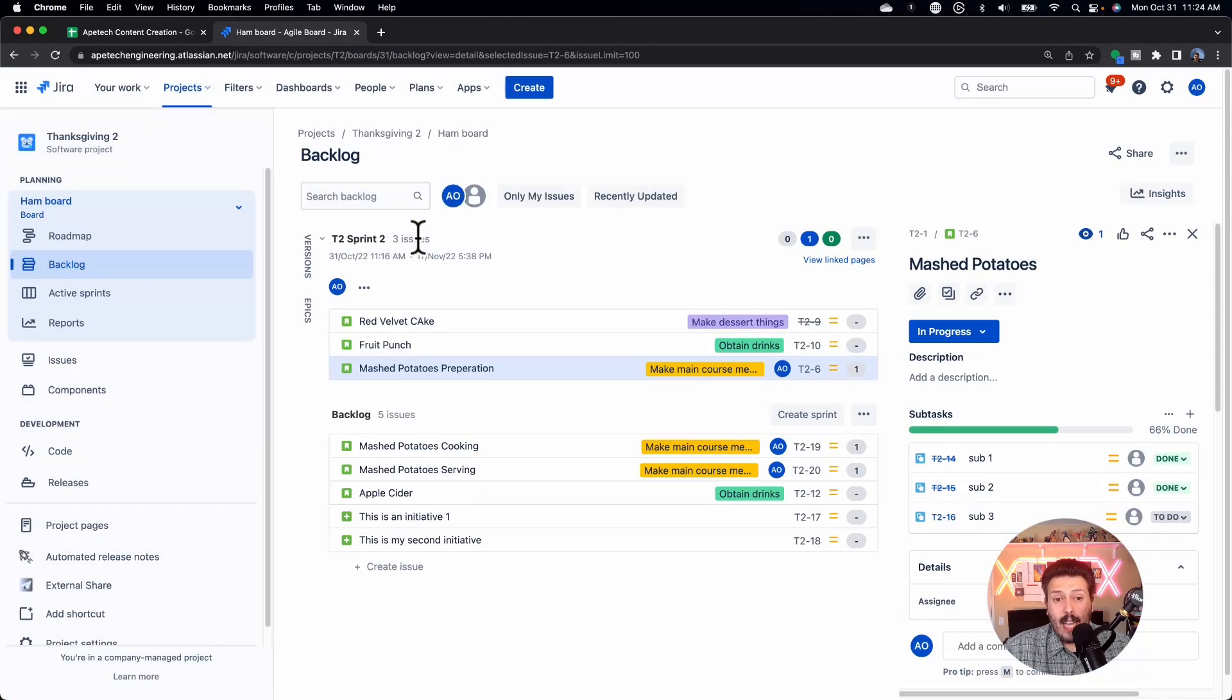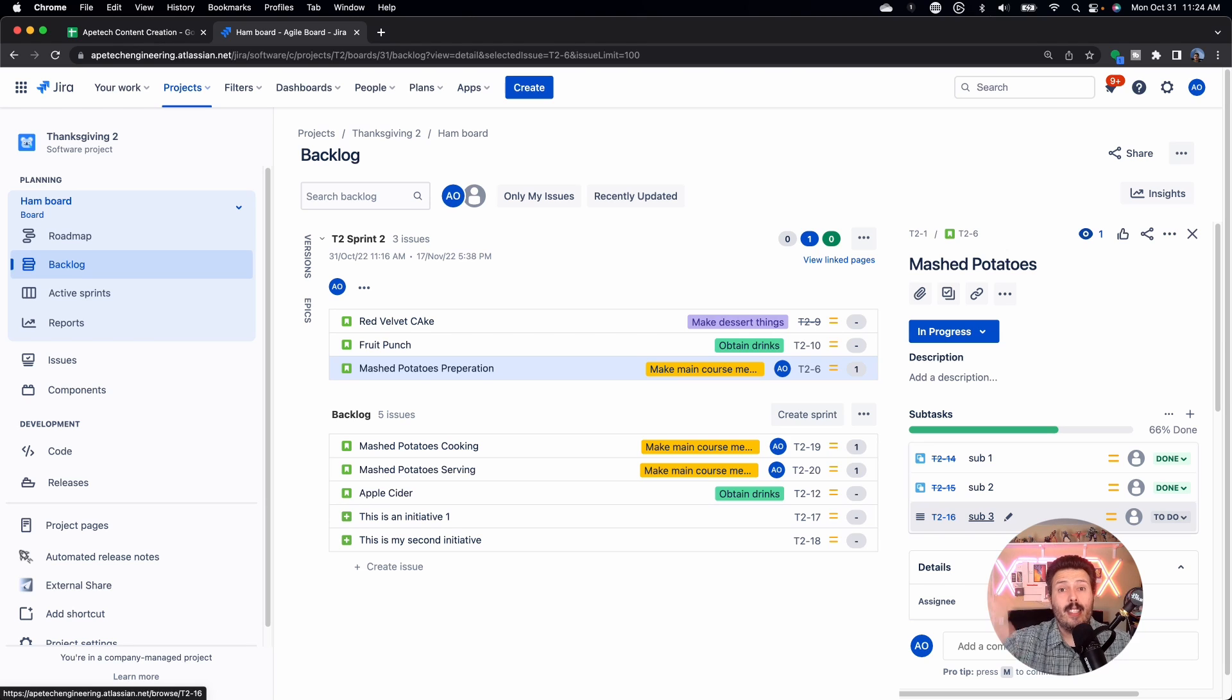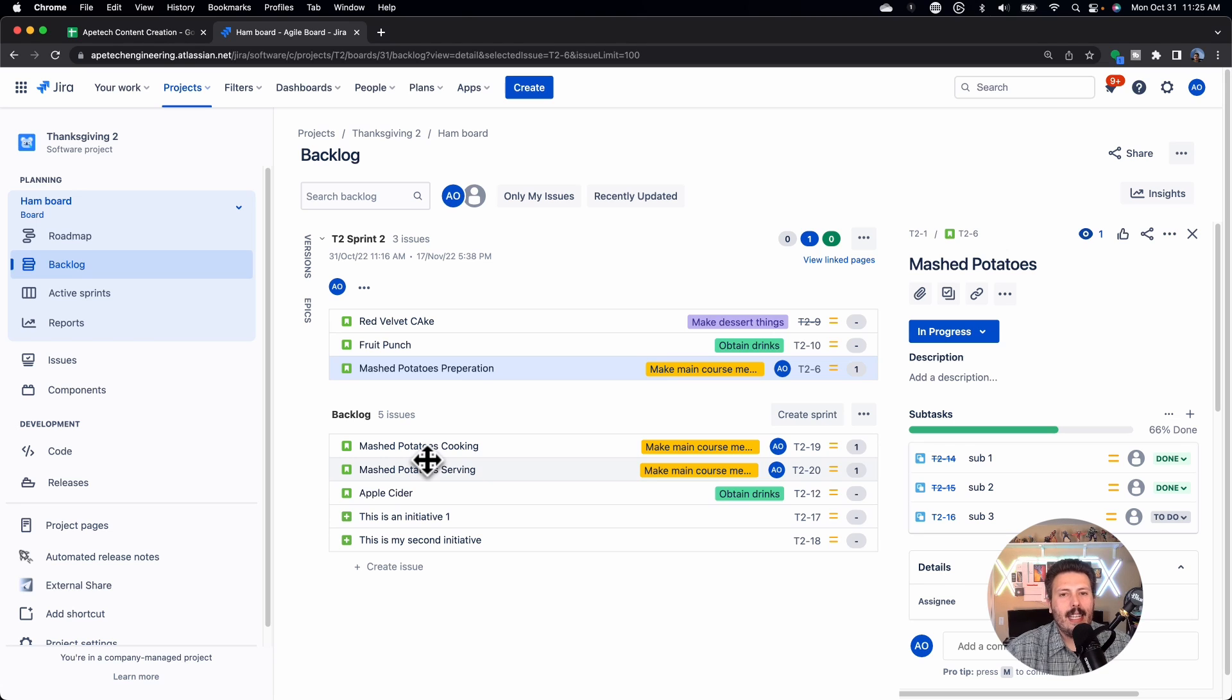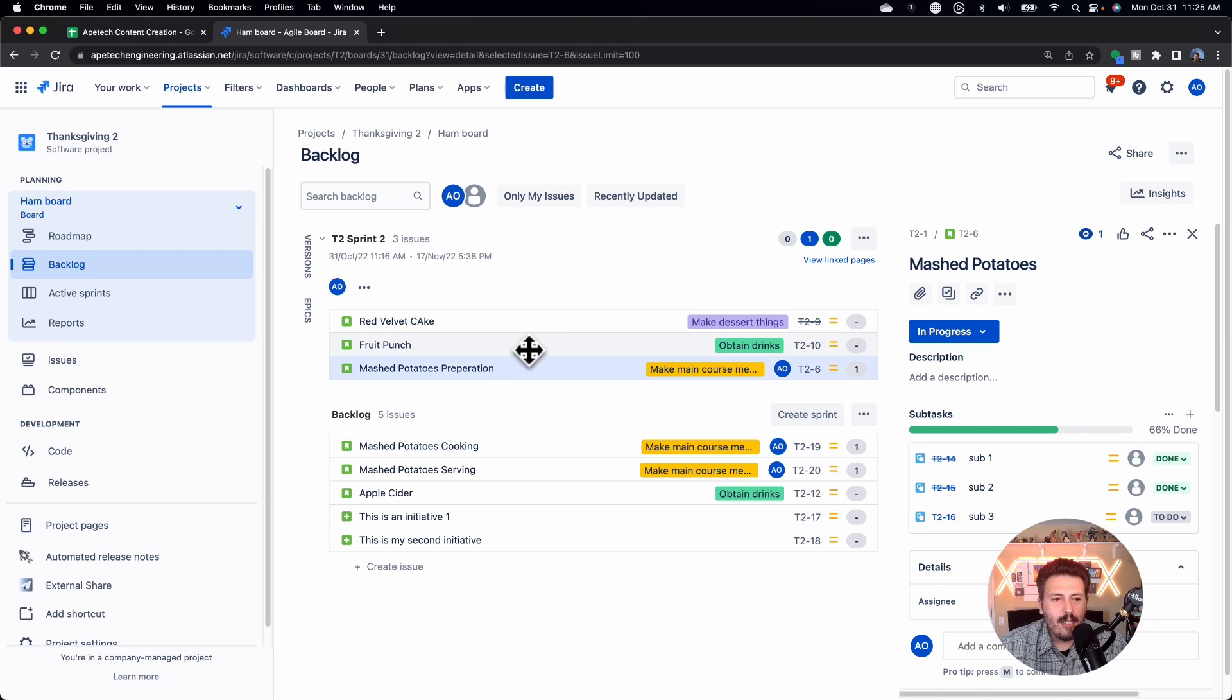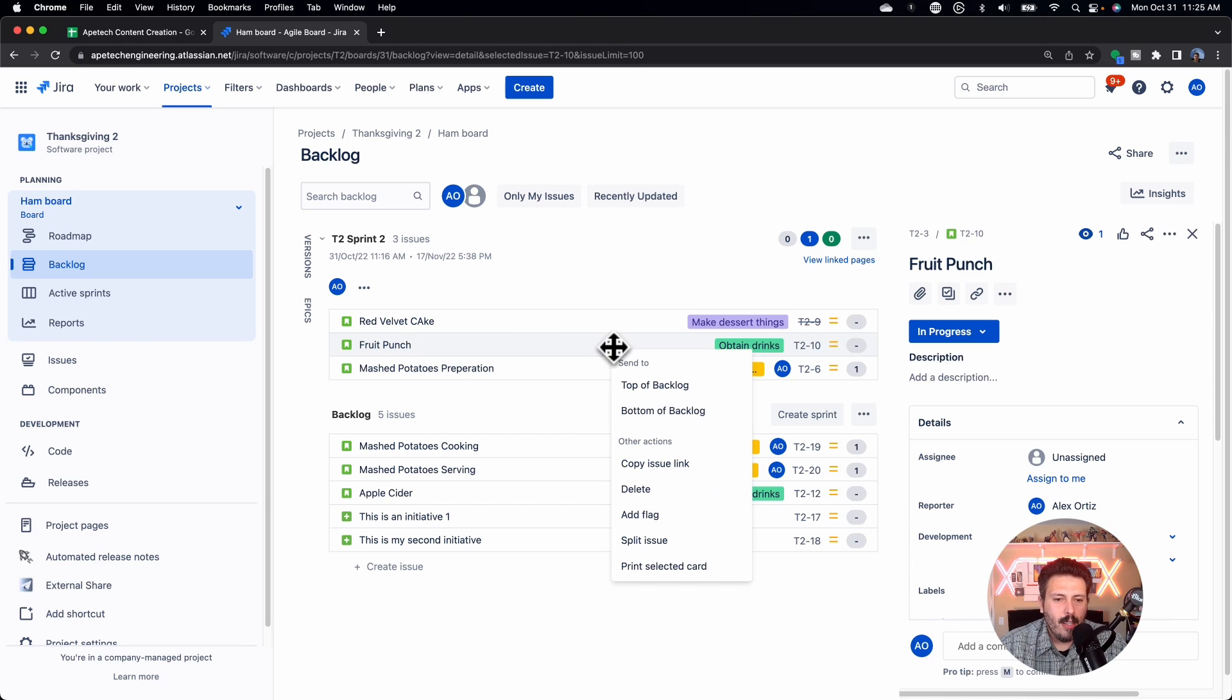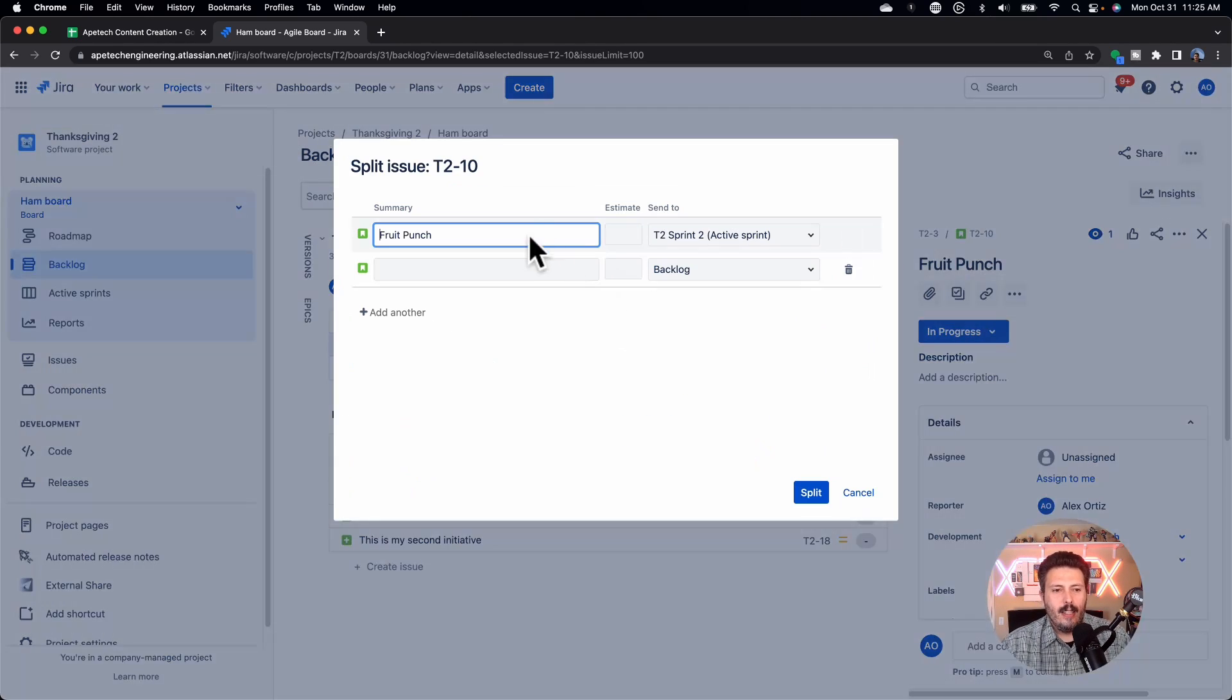So now I can take this mashed potatoes, close it out. Obviously, I won't be able to do it now because I have subtasks that are incomplete. That's a different problem for a different day. But now you can see here on the top of my backlog, I have the two new stories that I can now plan and prioritize into my next sprint. So as you can see, this is a pretty effective way, just super simple, right? Just go to whatever issue is incomplete, right click on it, split it, take credit for what's done, right?